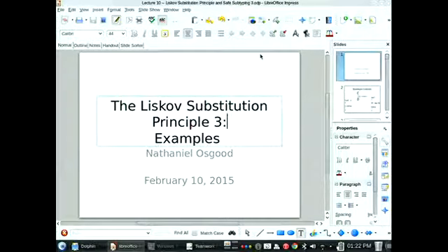But the basic gist is T2 and T3 are different than T4 in the sense that they have some flexibility about when you schedule them, because they won't be the ones delaying the whole project. T4 is the one delaying the completion of the whole project. And in scheduling, and particularly mapping out this sort of diagram, tasks, dependencies between them, and times associated with them, and reasoning about it using a simple linear time algorithm, is the essence of the CPM method, the critical path method. This is a method for identifying what is the critical path. And it's a useful technique, particularly because it allows you to identify the critical path.